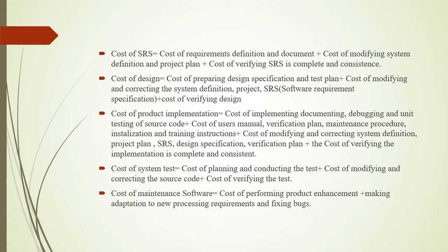Next, cost of system test is equal to cost of planning and conducting the test plus cost of modifying and correcting the source code plus cost of verifying the test.